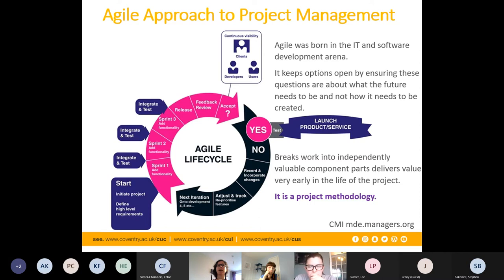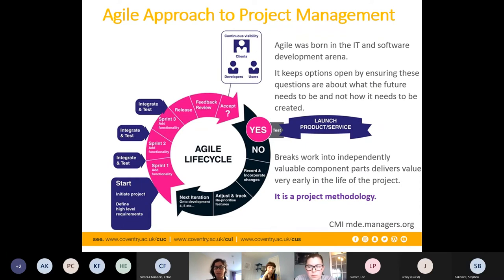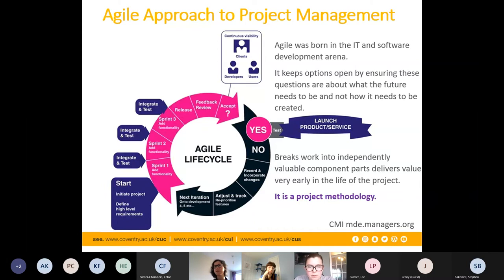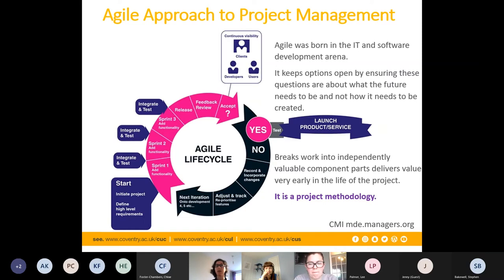In practice, applying agile involves user research, building hypotheses, building quick prototypes with no code behind them to figure out the best way, then adding code and committing to real life. One downside of agile is it's often seen as lacking in structure and documentation, which can lead to scope creep if uncontrolled. There are many types: scrum, six sigma, lean, and others. Good agile still involves significant project management to pull everything together.